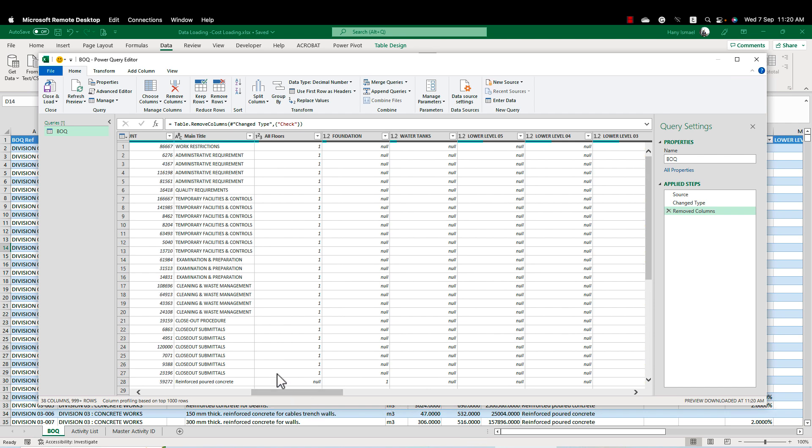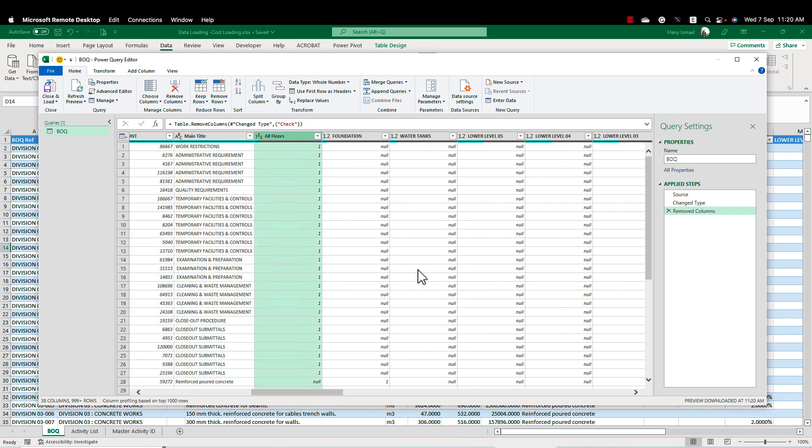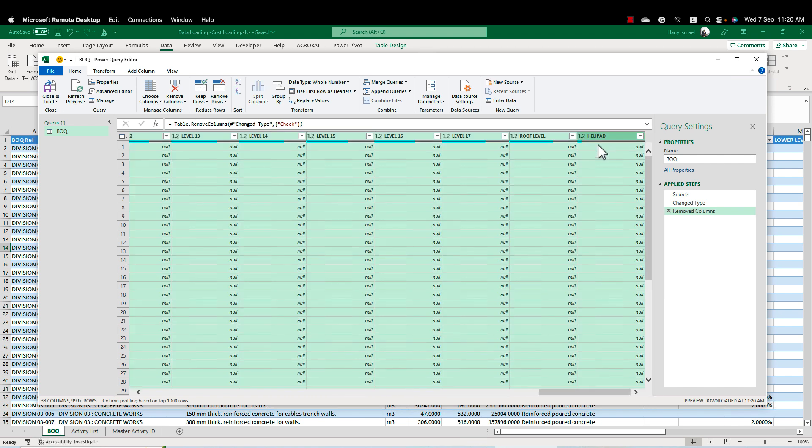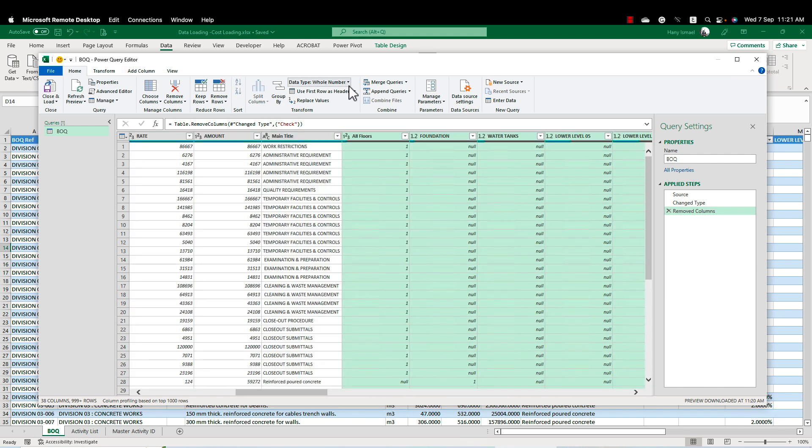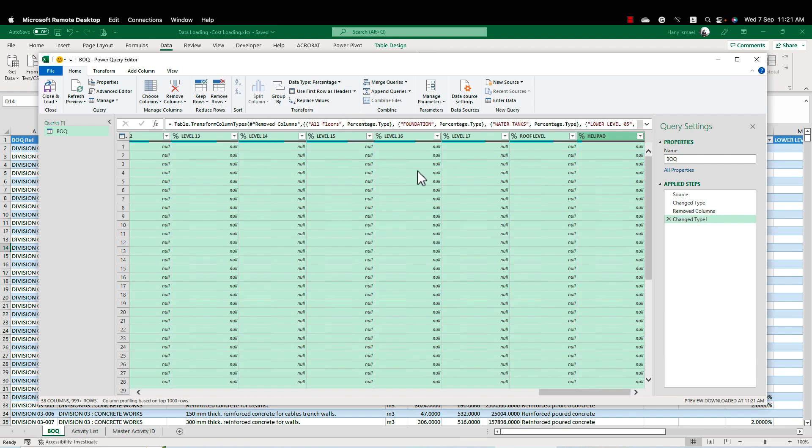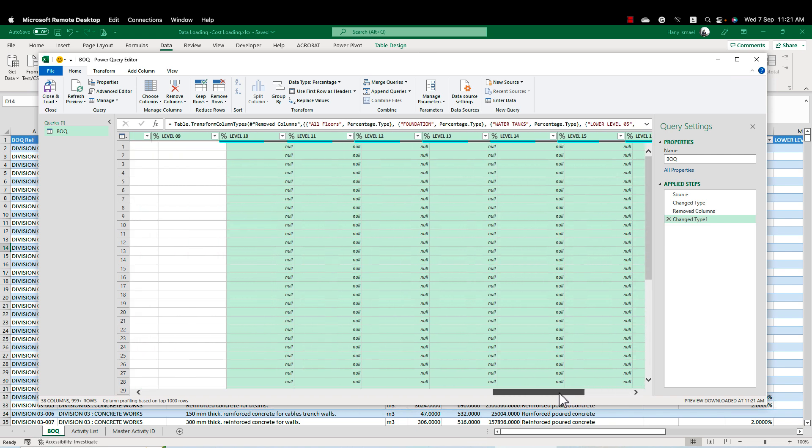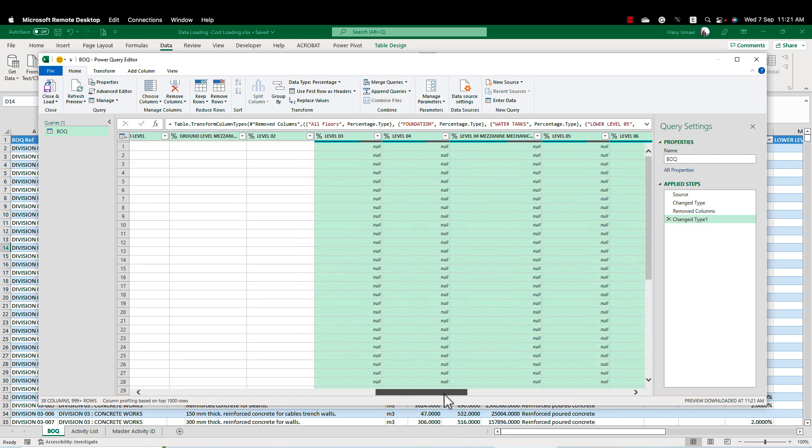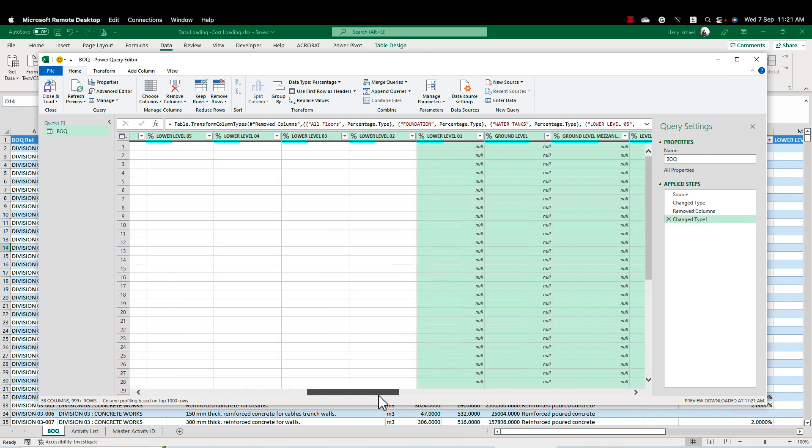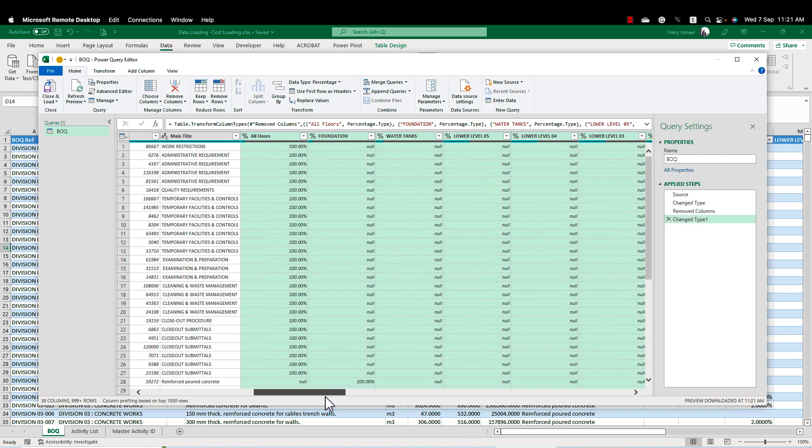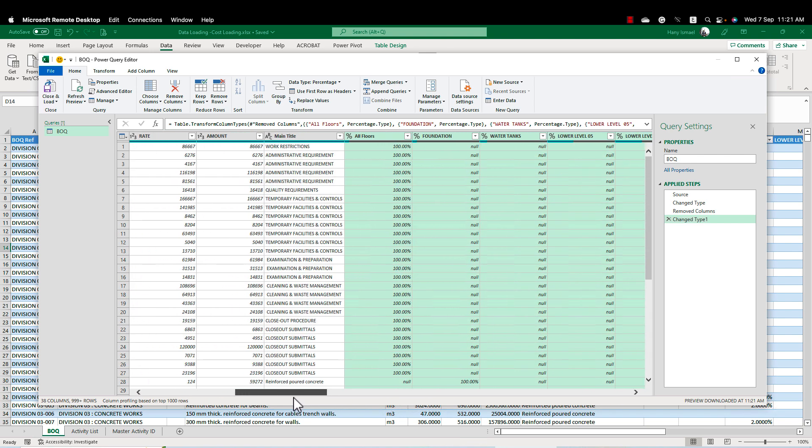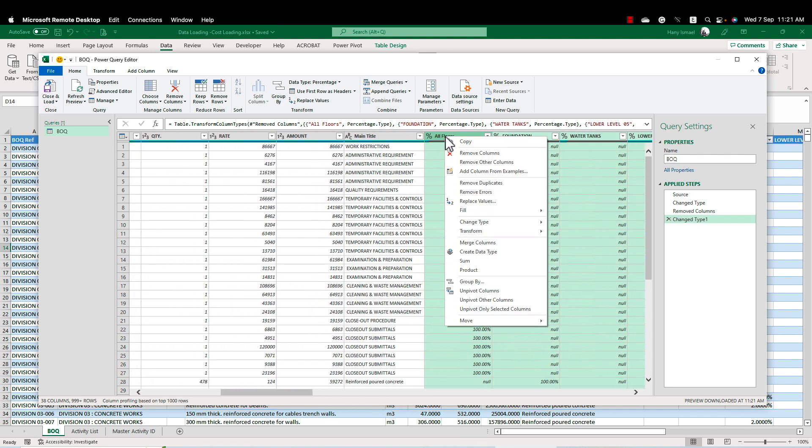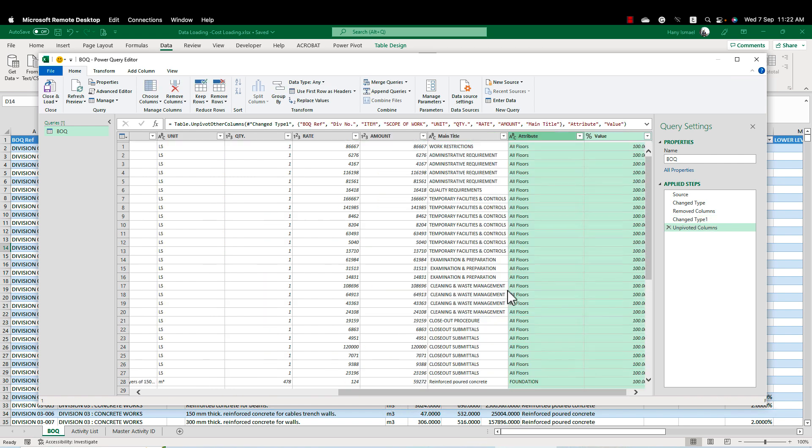Now I need to change all the floor numbers into percentage. So I can make shift and select here from the first to the end. Then from home here, data type, I will make it percentage. So I converted all the numbers here to percentage. Now I will make something called unpivot. Unpivot will make for me the required step to make my cost loading. So I'm going right click and click unpivot columns.